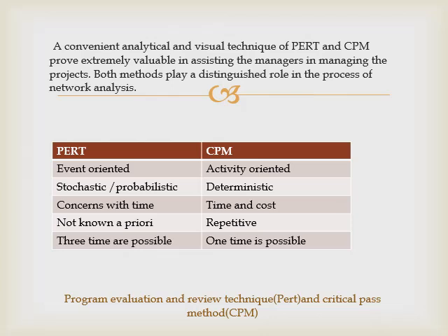CPM is suitable for establishing a trade-off for optimum balancing between schedule time and cost of the project. CPM is activity-oriented, not event-oriented.